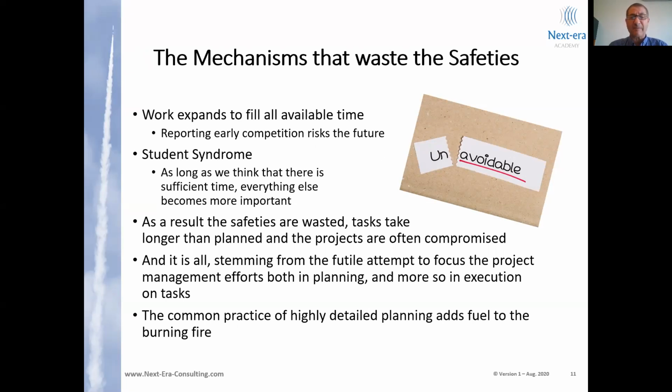The first one ensures that if a task can complete earlier and bring this safety towards the next task's uncertainty, this is rarely happening because people rarely complete the task before the duration they have asked for. And the second one says that if we do not start as early as possible, when we could have started the task, and we delay the start because we believe we have enough time, if Murphy does hit us, then the probability of late completion significantly increases.